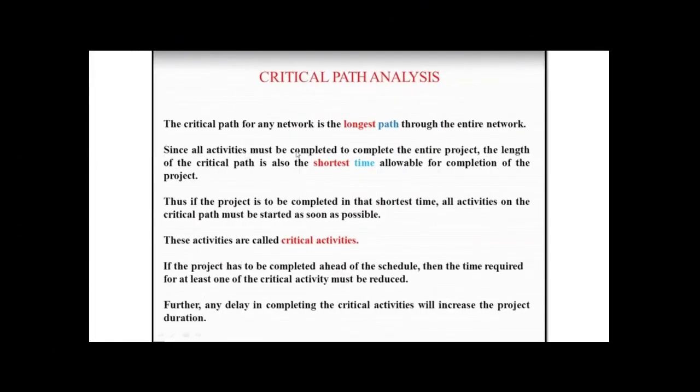And this critical path that was identified in the entire network, we mean after going through the series of activities from beginning, in between activities, and the end activities of the entire network. This critical path is the longest path, but this is also the shortest time allowable for the completion of the project.